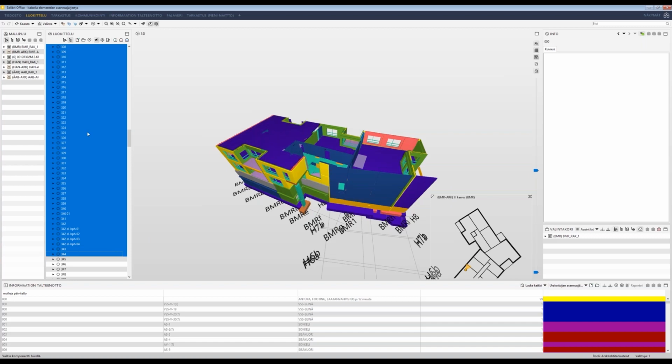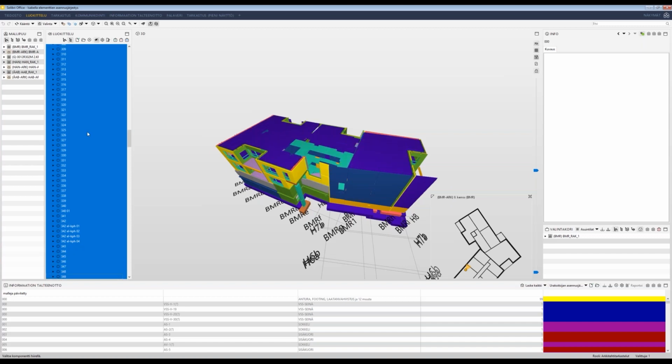All of these didn't have to be made manually, but instead we created the basic installation order for one floor, and then used the Solibri classification rules, in a sort of clever way, to copy the same installation order on the other levels also.